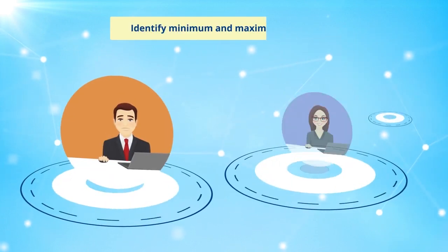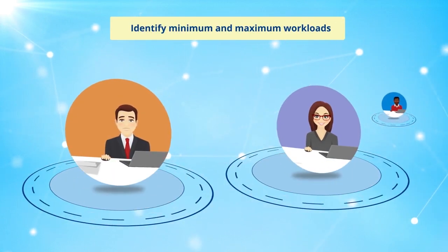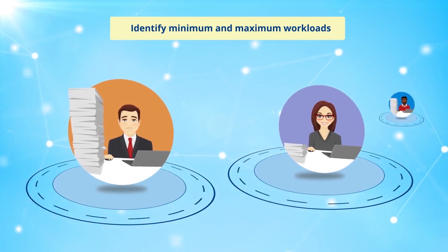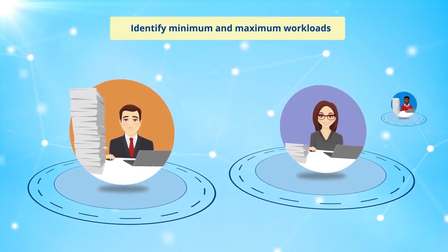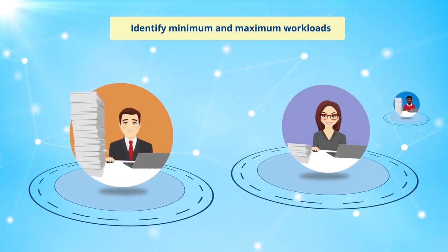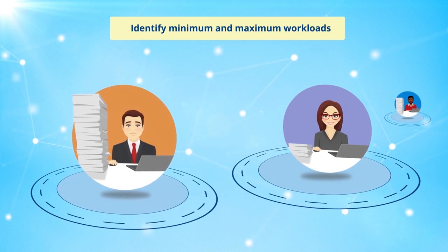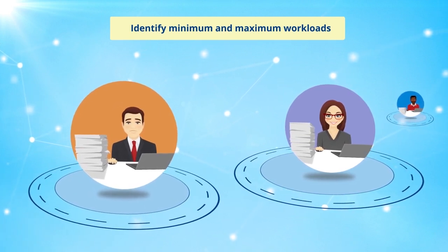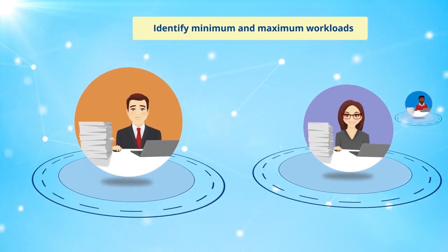By setting WIP limits, we also look at what is the minimum and maximum amount of work that we want the team to be working on concurrently. We want the limit to be realistic so that we don't start to try and multitask within the team, which ultimately causes more damage than it does good. Usually, we'll set those limits and agree on them during the planning parts of the project.